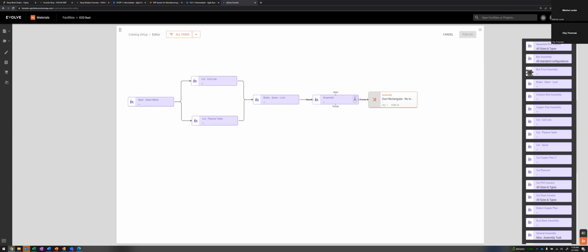In our experience with these new features that we've added over the last few weeks, you should be able to plan a work request with half a dozen spools in it, or in an electrical context, maybe 40 or 50 spools in it, with drawings in 5 to 10 minutes. Once you start getting a good process for how you're getting your drawings into the drawing register and how you're structuring those, once you get a little bit of parts catalog content created, again, it only takes a few minutes to plan those spools. So that's the quick update.